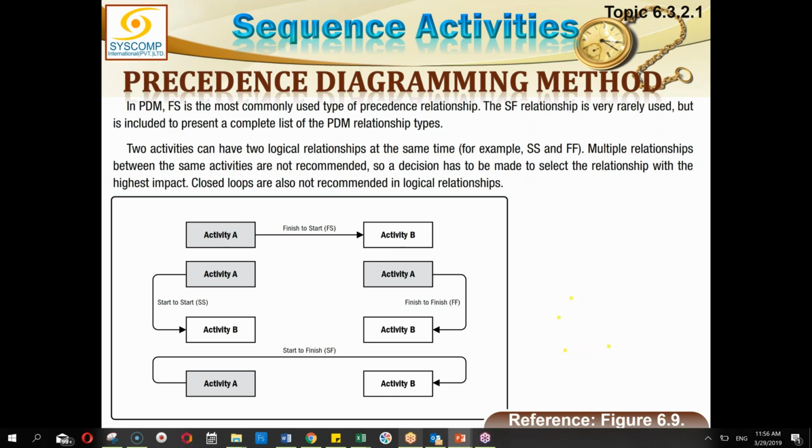Well, the only solution would be to have a CR or something to, for example, increase the resource and do the foundation in lesser days. Because otherwise, you cannot build a wall without a foundation. So that would be a disaster.